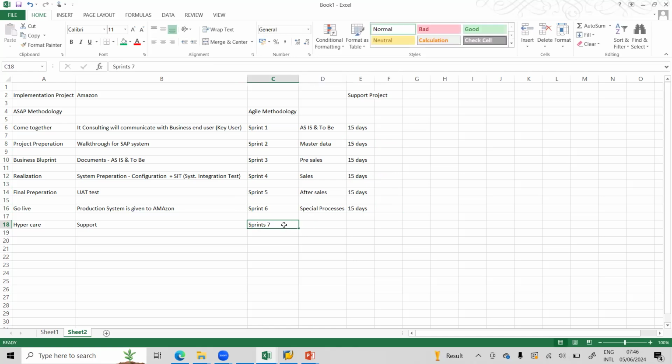Of course, this has to come through management, our management and their management. Because once the project is finalized, we don't take requirements, because we have fixed costs for each consultant, correct? We have to understand the professionalism. So we tell them in the beginning also that whatever requirement you give, make sure you give 100%. And this is how it is done.